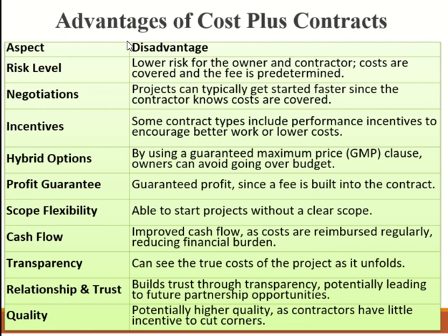Okay, the profit is guaranteed. So if anything happens, the profit is separate. Whatever happens will happen with the cost item: change in material, change in quantities, change in scope. This is where you are doing it. But in the other cases, something can be taken from the unit price as well, something from the lump sum. So in this case, the profit is guaranteed. We have flexibility.